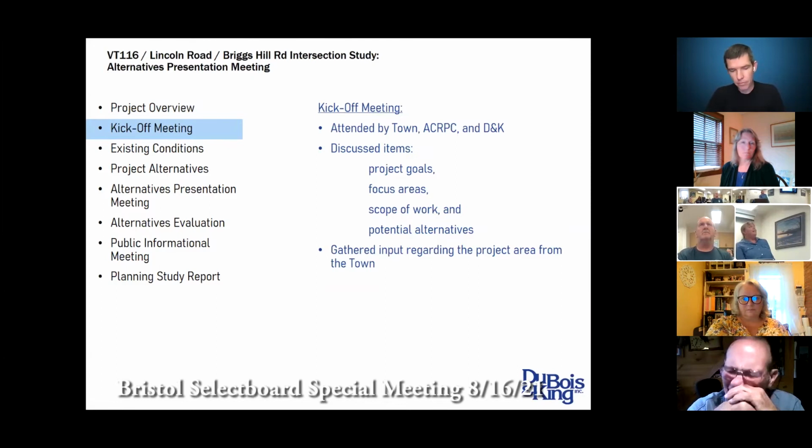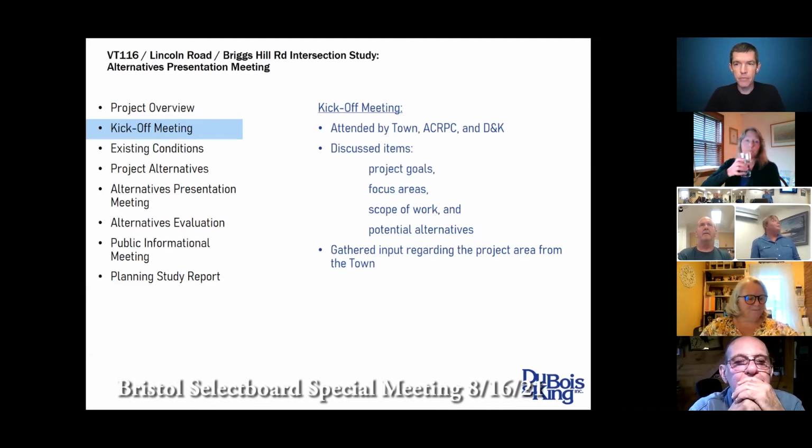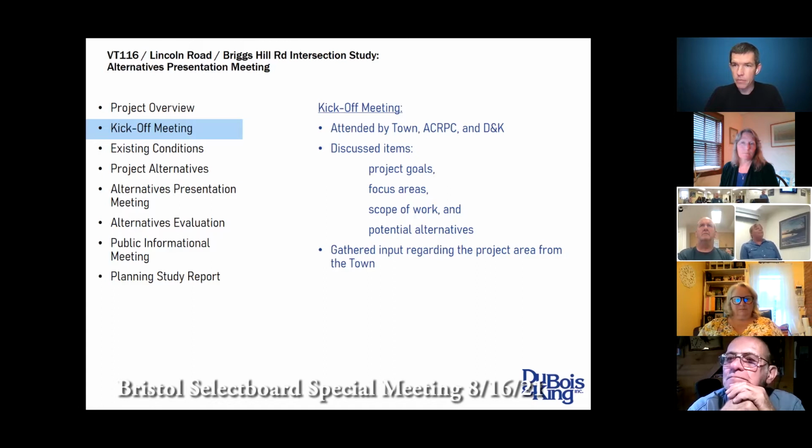So the beginning of the project, the first step was always the kickoff meeting. We met with the town and Mike Winslow, who I believe is on the phone from the Regional Planning Commission, talked about the goals, the focus areas, made sure that we were all on the same page about what we presented in our scope of work, and talked preliminarily about alternatives, bouncing some ideas off of him in terms of what level of improvements they might be looking at. As you'll see later, there are some low cost measures and some that are quite expensive. So we wanted to get a feel of whether something that might seem a little on the lofty side is something they still wanted to at least consider or not.